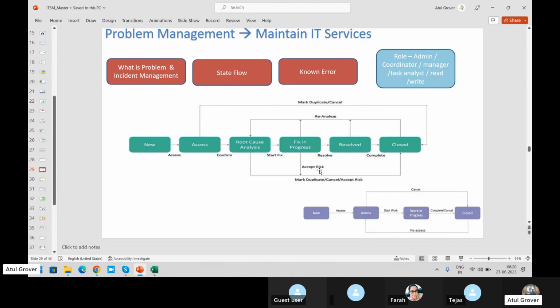Then what do I do as a service provider? If tomorrow any incident is raised, any P1 is raised, you will charge me. Why should I pay where I'm not guilty or at fault? Then we ask the customer, let's raise this as a risk and mention that any incident raised against this particular server will not be considered for the penalties. And we add that risk in the RAID log. RAID: risk, assumption, information and decision.